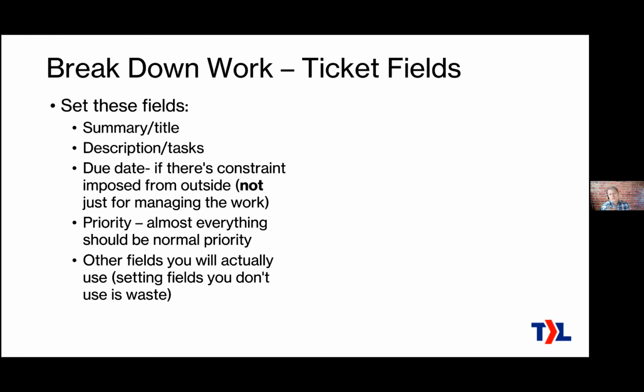Or maybe you do some work for a school, like our MSP does lots of work for schools, and school starts on a certain date, so you better have that Wi-Fi installed by that date, or whatever it might be. That's for due dates. The priority in project work, you don't make much use of priority. At least at the beginning, everything should be normal priority.